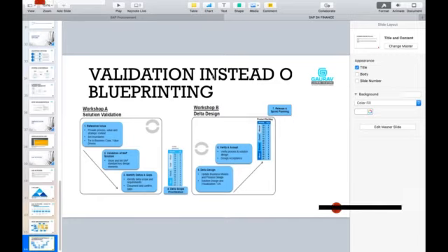Now, once you identify the gaps, let's say, just for example, there are 16 gaps. Out of 16 gaps, you need to identify which are more critical and which are less critical. You have to prioritize based on which gap you will try to solve first, which will come second, what will come third, and what will come fourth. So we see here there are 16 gaps in this example. 4 are must, which are most critical. Then should, then could, then would. So this is the priority in which you will go ahead with the gaps.